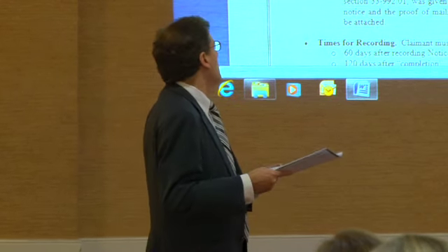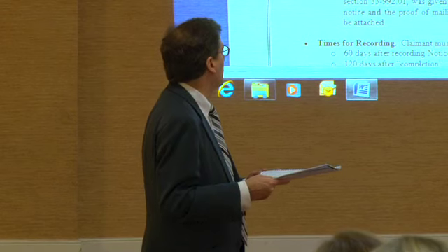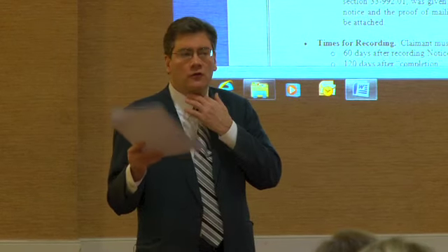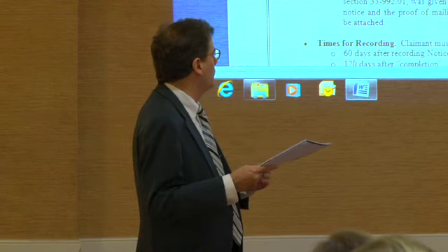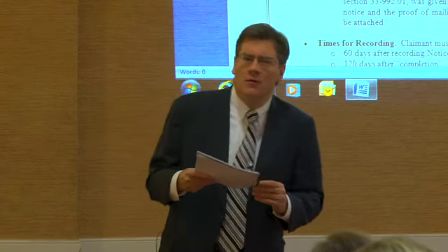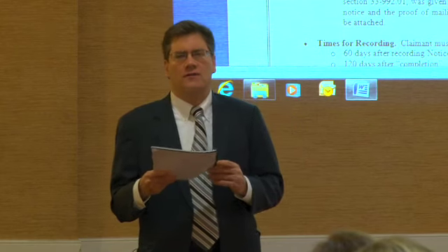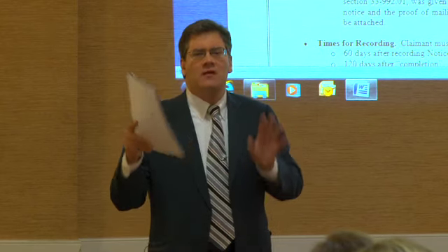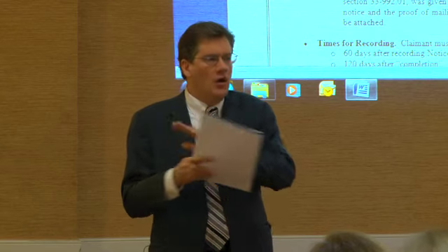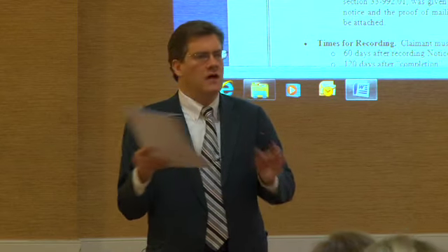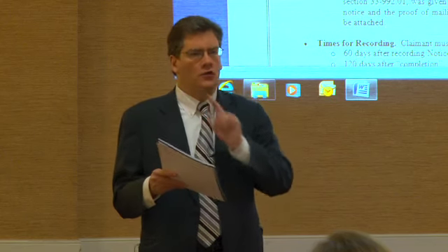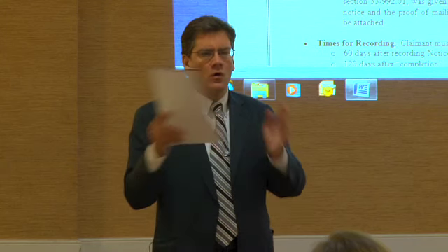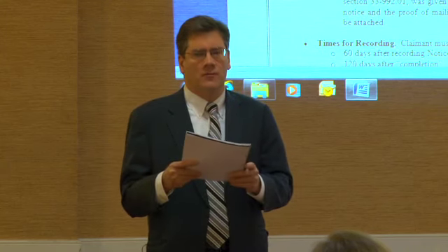All right? The name of the owner or reputed owner of the property concerned, if known. Now, two things here, two lookups here. First of all, again, the deed is going to supply that information to you, who the owner is. And you might want to check with the Corporations Commission, if it's a company that owns the property, to make sure you've got that information right. All of that information is available online. You go to the Corporations Commission, you type in a business entity search, it'll tell you the correct name. It will also give you service addresses for a corporate, a business owner of the property.